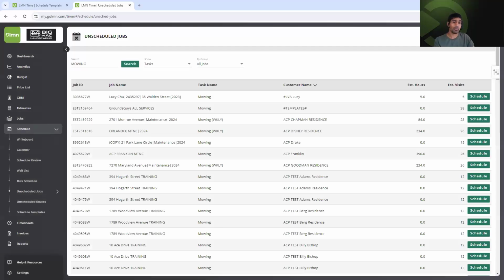Now, what I want you to keep in mind here is this list should be as small as possible. We don't want you to have any unscheduled work, because honestly, if it's unscheduled, it means a customer is ready to pay because there is a contract built on the system and a job was created by your project manager. Well, if a job was created, that means you had approval from the estimate. Unscheduled means the customer is ready for that service to be completed at their property, but you have not actually scheduled it in your records. So I'm going to leave it up to you, but every week or bi-weekly, you want to make sure this list of unscheduled jobs is as small as possible.